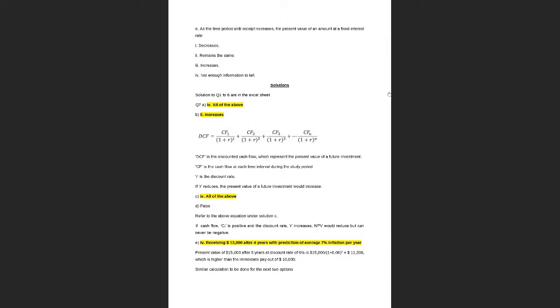All right. Whew, quite a long description from my side. So what is there in this first question that I asked to Ali and Soradeep was, if you remember in our last workshop, we came up with a query in finding the EAC. So when we want to find EAC, first we have to find the CPI, cost performance index, right? And while we were finding CPI, some of us took the exact value, which is 0.866666, and in the solution it was rounded up to 0.87.